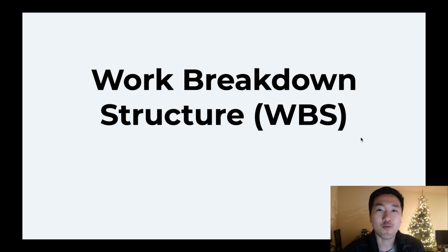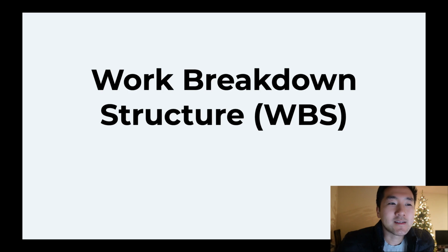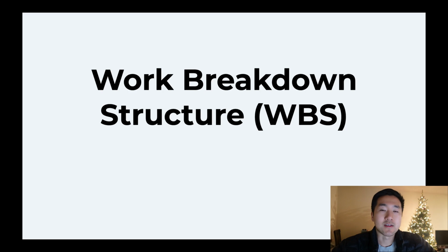Number one, work breakdown structure, WBS for short. This means taking a task or project that you have and breaking it down into the most simple form. So, for example, if you're building a house, it's breaking the house down into what are the materials that you need, what are the things that you're trying to build, so like the roof, the flooring, the ceiling, all of that stuff, breaking it down to the simplest form so that you can really understand how much time, effort, cost it'll take in order for you to get it done.